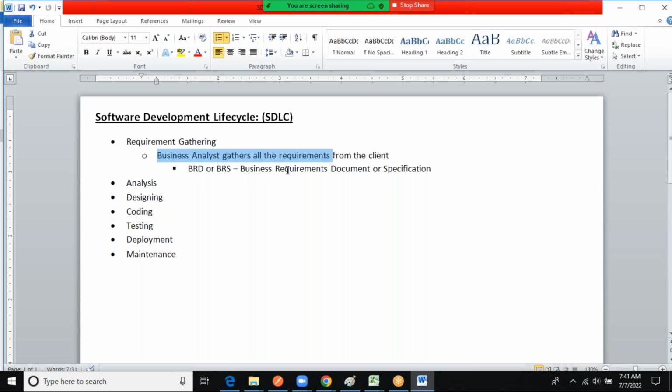Management, with the help of the business analyst, talks to the client and gives very rough estimations as t-shirt sizing, meaning large, medium and small. They categorize the requirements, count how many large, medium and small there are, and estimate the time each needs.